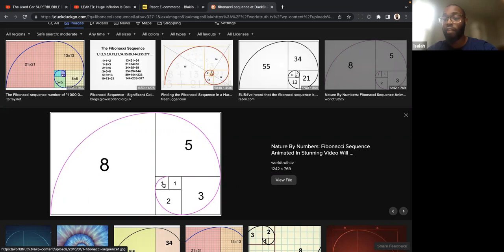So the level of complexity is going to be compared to how big these sections are. If you give a ticket or a task a level of complexity of one, that means it should be done within an hour or two, if you want a sense of time also.